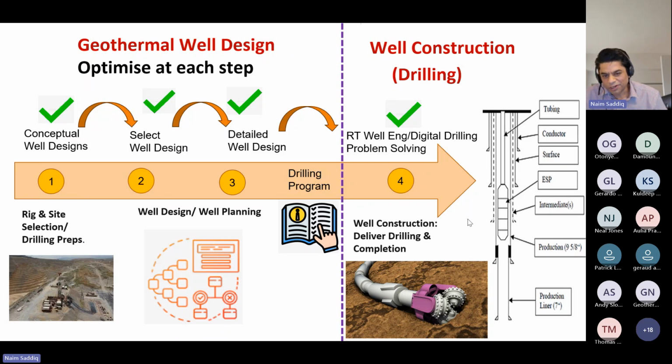If you have a wrong WBS model, if the wellbore stability model is not fine-tuned and correct, all kinds of problems will break loose. Then you will have huge NPT, failures, stuck pipe and everything. If you have picked the wrong rig, one that cannot handle a certain technical limit, it's breaching the limits and issues are happening. What are you going to do at that point? You cannot stop drilling now because the rig is already there.